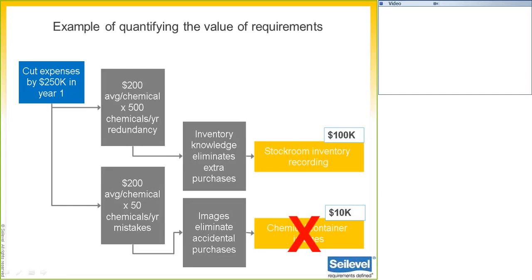I've been on projects where a stakeholder will ask for something, like, hey, can we just make this quick text change or make this quick color change or move this button over here? And at the time, the features don't really look like they're going to add up to that much effort. But they really do add a lot of cost and risk to include them. And the reality is, you probably don't really need them all the time.